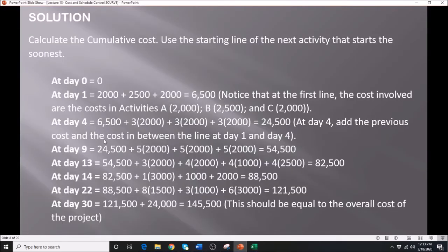Doing that will allow you to calculate the expenditure at every given time. So we have all of those values now. The key here is that we don't need to start from 0. We can carry over the previous costs, as with the 3.5, we carry over to that, and anything in between the previous line and the current line is the only thing that you're going to add.